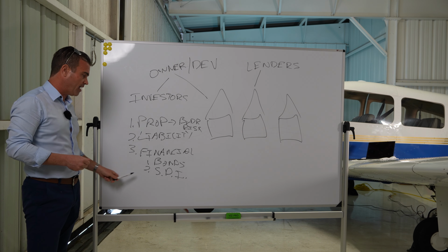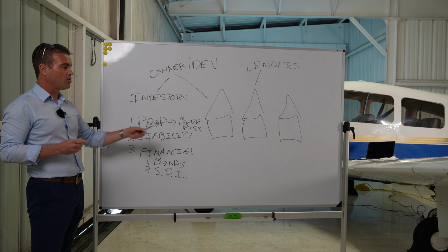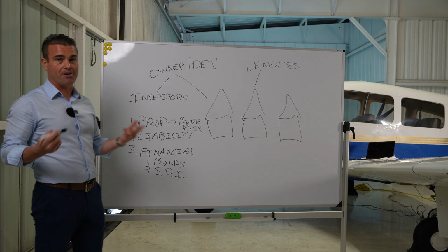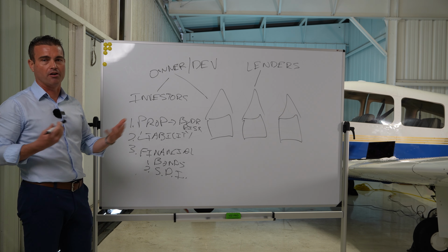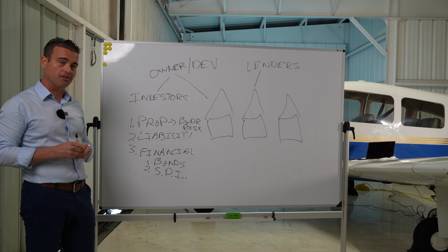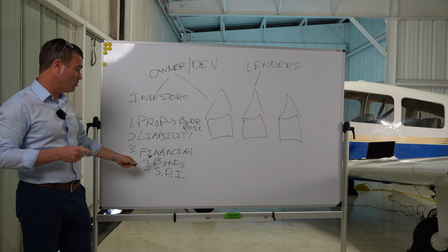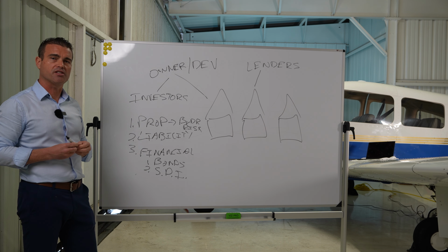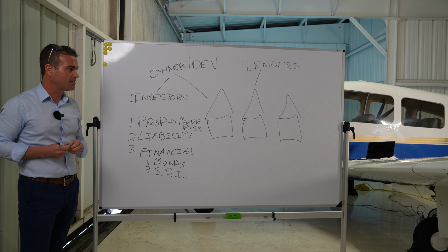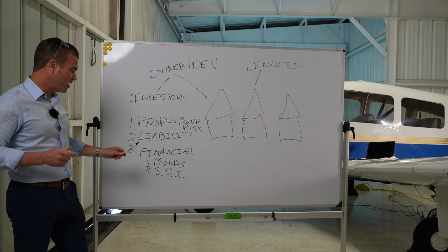Now, again, just to recap, why are the financial products so important? I've had this happen even within the last year. We had a large civil contractor on a job. He walked away, right? He was not bonded on that job. We came in. We were part of helping fix what we could. I had another one this year where the electrical contractor walked away midway through the project, and there were no bonds and no SDI, right? So both of those were seven-figure hits. And the SDI on something like this, for the entire project, I think it was, we looked at it, would have been $150,000, right? So that's why it's so important.